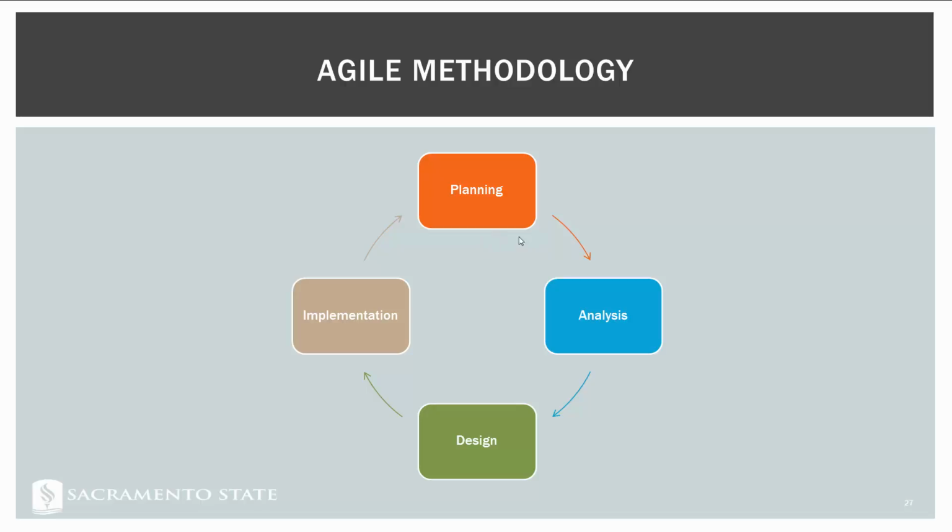And there's some indication that with Agile, the trust of the team is more important than in other methodologies. Sometimes we'll have teams that might not like each other, or that might be teams that depend on each other for certain aspects of a project. With Agile, there's some indication that close-knit teams that work well together do extremely well, whereas they do very, very poorly if they don't get along well.